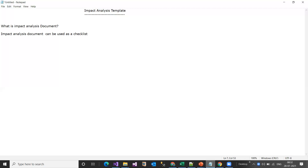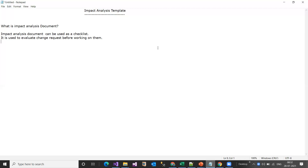That means it is used to evaluate change requests before working on them. This document basically evaluates the change request's purpose, impacts, and risks. All this analysis is included in the impact analysis document before the respective team starts working on them.